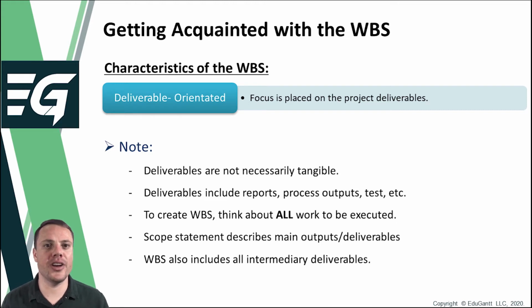The project management industry has, however, to a large extent altered the legacy approach of breaking down the work to an explicitly deliverable-oriented structure. The actual work that has to be done or the activities that have to be performed are specified in other independent documents, usually as part of other processes. The approach suggested by the Guide to the Project Management Body of Knowledge 6th edition is a good example of this practice. According to the PMBOK Guide, the deliverables are specified in the Create WBS process, which is a process that belongs to the Project Scope Management Knowledge area. The deliverables specified in the WBS are then further broken down into the activity level as part of the Define Activities process, which belongs to the Project Schedule Management Knowledge area.